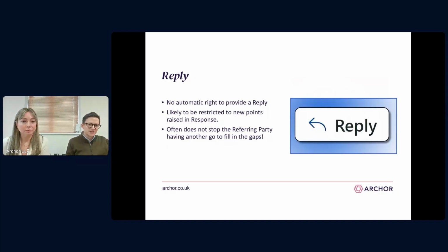The next submission is the reply, and in most straightforward disputes, that's often the last submission, although sometimes you can get, in an Inception style, 5 or 6 submissions in a more complex dispute. Often this will give the referring party the chance to address new allegations in the response. So there might be things that weren't part of the scope of the dispute originally.